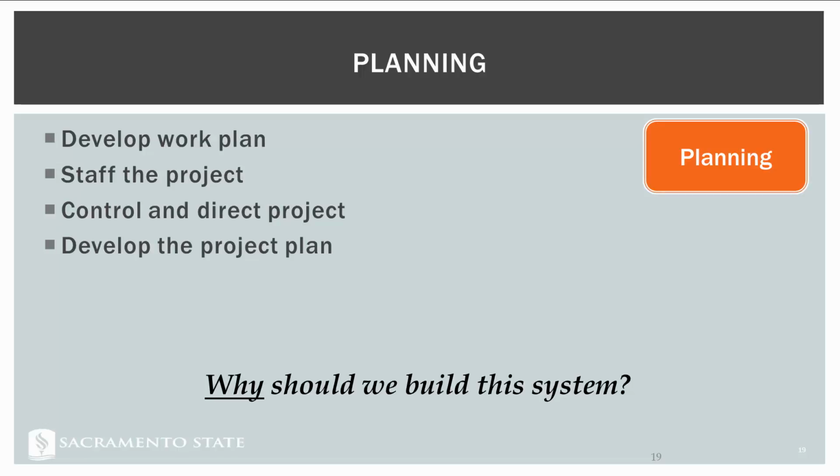The second part of this is we figure out all of the planning stuff that needs to go along, what the project manager needs to do. We develop all of the different tasks that need to be performed. We come up with estimates of the time that is required. We do our work breakdown structures, all of the different things that you talk about in other classes. Sometimes this is discussed in OPM and other project management classes. And we work on all of those and then figure out how this project is going to be staffed, who's going to be in charge of it, and we build this plan. And so we have a decision on whether to go ahead with this project, but we also have a project plan moving forward.